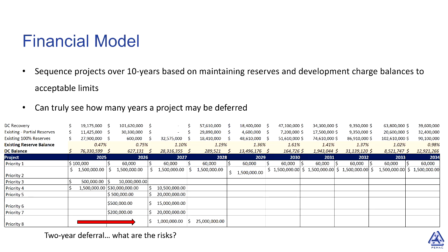And then I'm also showing another funding source, our development charges that we get so that we can support new housing. In any given year, we can't have a negative balance. So what actually happens is that as we go over time, some projects get pushed out because we can't afford them. This number 8 here, we might have wanted it next year, but it might have to wait another 2 years because of affordability. Now what we can do is we've assessed all the risk. We can communicate, if we don't do this, we have risks.